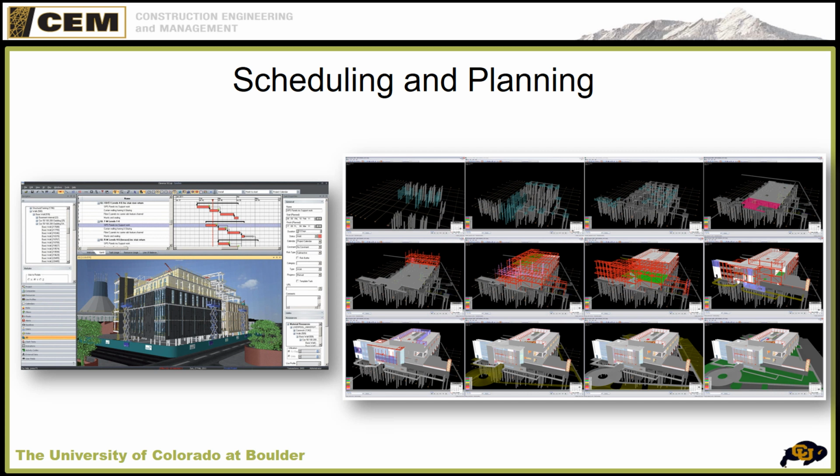Then at that point, we can start to figure out responsibilities, assigning subcontractors to do the work. The general contractor would assign people in-house to manage the work, and we start to get a team together to tackle the project. We also build schedules to minimize delays. So if we know we have something finishing on Tuesday, then we can start the next activity on Wednesday, and we don't need to figure that out on the spot. We can look into the future and do that.